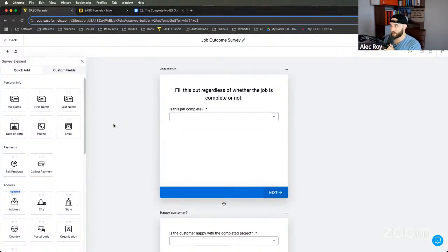Roofing calls this a certificate of completion. It is extremely beneficial to have a certificate of completion. What does that mean? That means if you're doing big ticket or long sales cycle, have the customer sign off on the fact that it's done. Why? Because they can't take you to court. What are they going to take you to court over? Oh no, I'm upset that he did exactly what I told him to do. Oh no, I'm mad that she did a great job. But how do we know that you signed off and said that they did a good job? Because we have the certificate where you signed off on it, right?